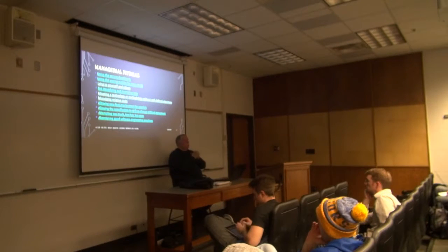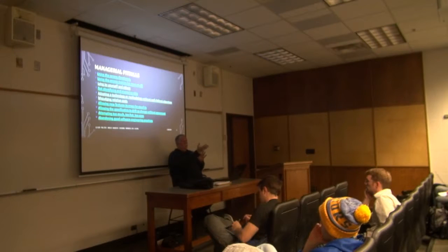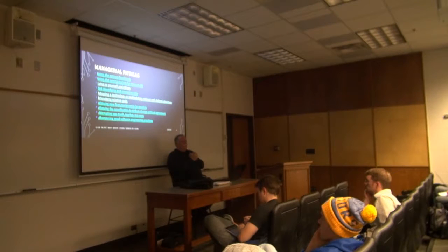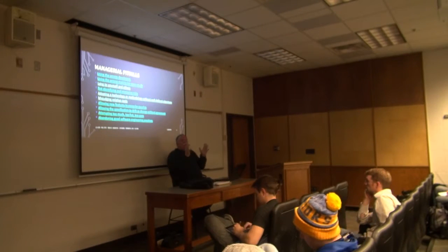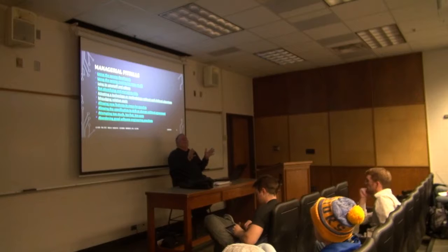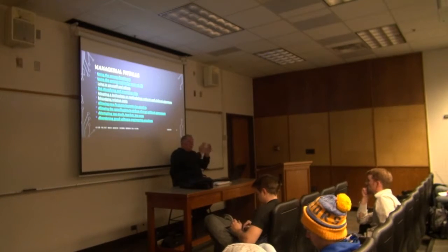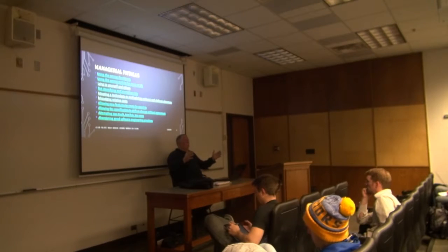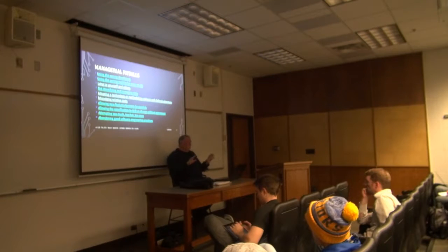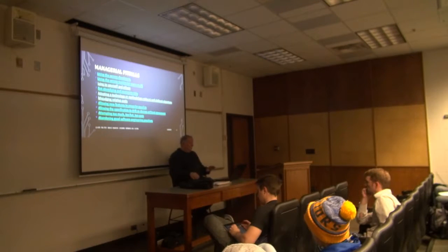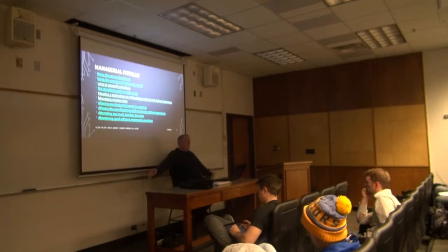You don't want to discover, I think with the side scroller, didn't you discover some problems with the platform compatibility of the engine across two different platforms? You don't want to discover that mid-project, as you had to because of the nature of the class. You want to discover that by saying, okay, let's do a little sample cross-platform project with this engine, and let's figure out what works and what doesn't. And from there, you can start to make reasonable estimates as to what it's going to take to do a real project.